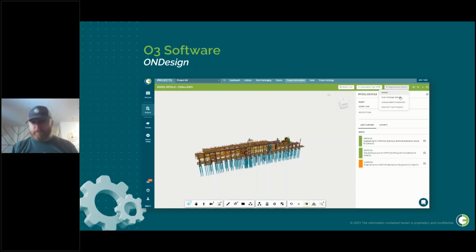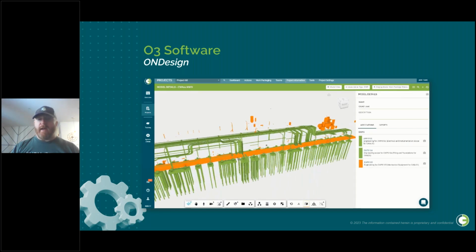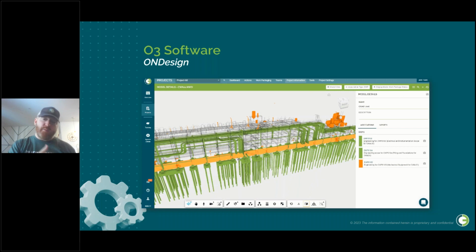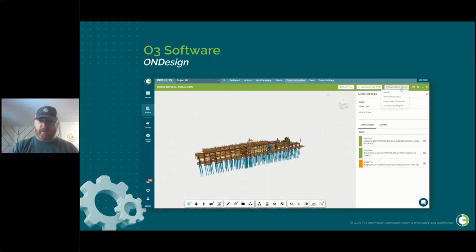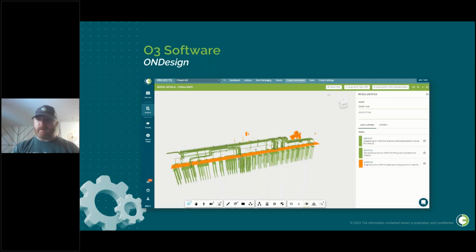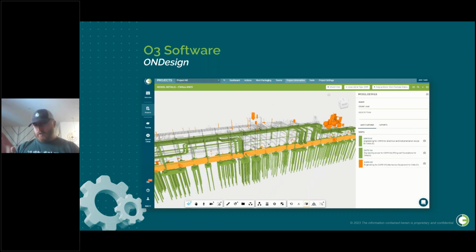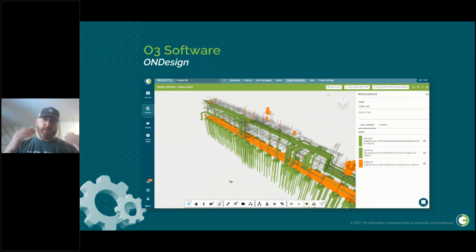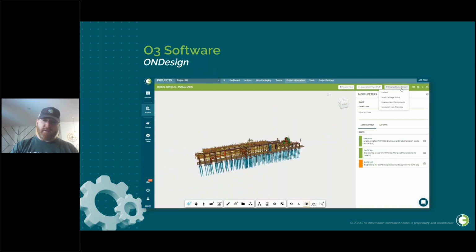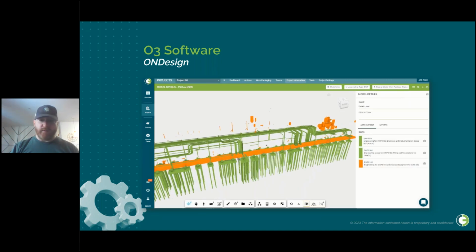So this is where we can use some of these tools, in this case on design, to help us understand, here's what construction is looking for, here's that preferred sequence of installation, and then we can start to map out the engineering requirements to support that. We can understand the constraints on engineering, we can understand the constraints from engineering to construction, and we can make sure that those packages are aligned in such a way that the engineering is delivered to support that sequence for construction.